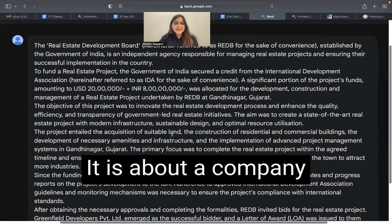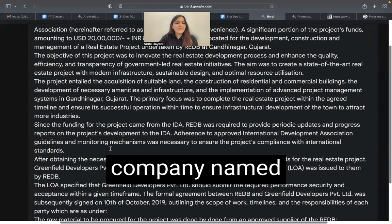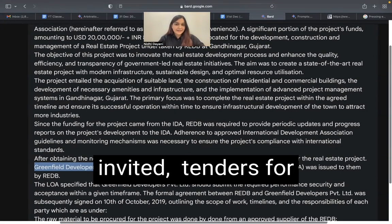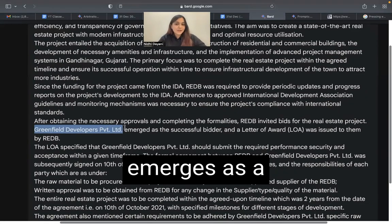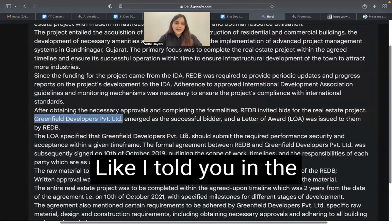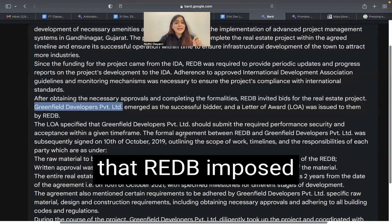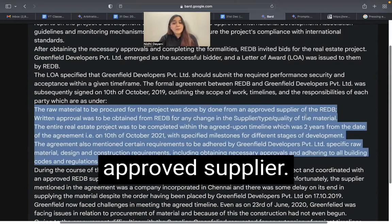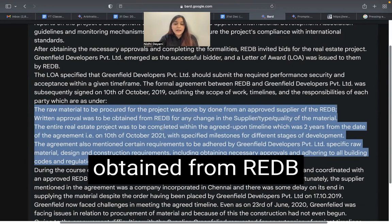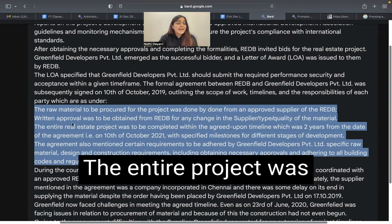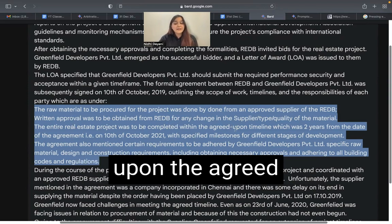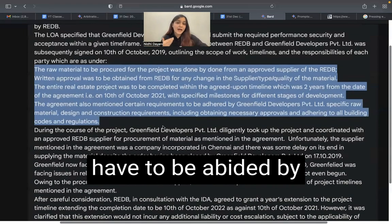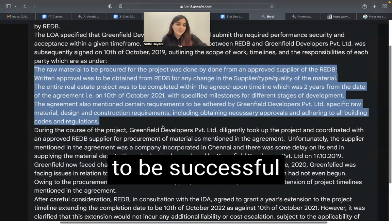I've given a set of fact situations to Google Bard. It is about a company named Real Estate Development Board (REDB) and another company named Greenfield Developers Private Limited. REDB invited tenders for a real estate project. Greenfield Developers emerged as the successful bidder and started commencing the project. REDB imposed specific conditions: raw material had to be procured from an approved supplier, with written approval required from REDB for any change in supplier or material quality. The entire project was also to be completed within the agreed timeline of two years from the date of the agreement, with specified milestones for different stages of development.